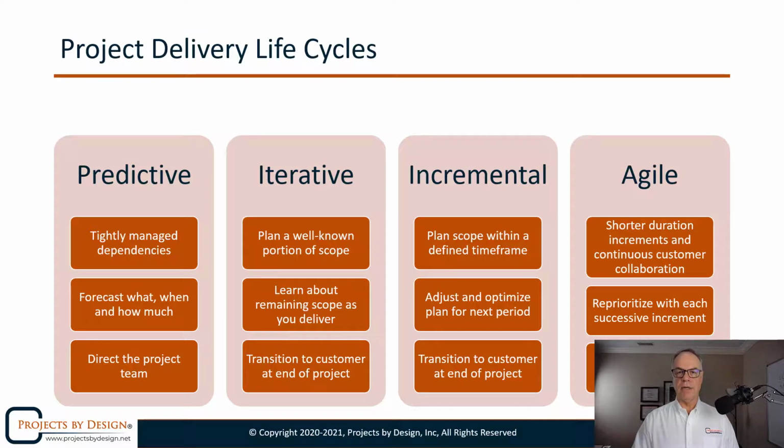The customer, though, the advantage of this is because we're delivering working product regularly during Agile, the customer is going to be able to start taking benefit during the life cycle of the project because they're seeing a working product that is ready to go for a release. One of the key things within Agile is we do releases of our working approved product at regular intervals during the project lifecycle. Value realization can start happening. In other words, we can start gaining the benefit of what we've delivered.